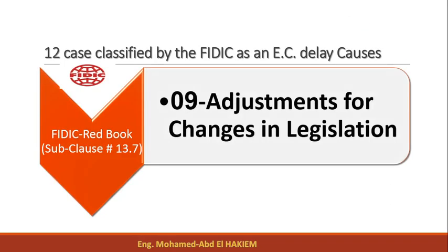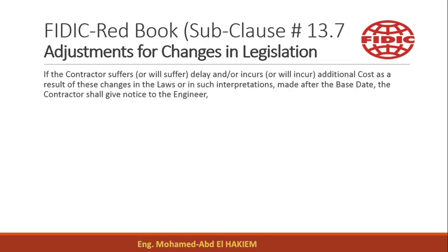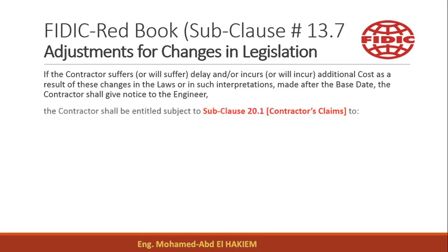Cause 9 – Adjustments for Changes in Legislation. If the contractor suffers or will suffer delay and/or incurs or will incur additional cost as a result of changes in the laws or in such interpretations, made after the base date, the contractor shall give notice to the engineer and shall be entitled subject to subclause 20.1 (Contractors' Claims).